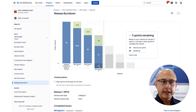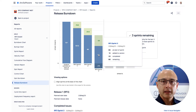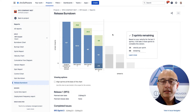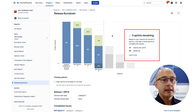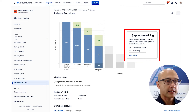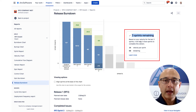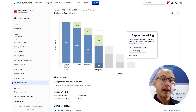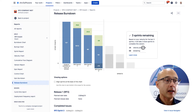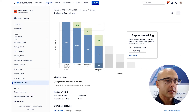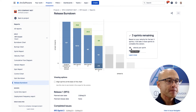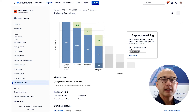For a more detailed breakdown, you can click on a bar to see the details. If you have at least three sprints completed, you'll get an indication of how long there is to go. Here it's saying three sprints remaining. It calculates that by taking the average of the last three sprints — my average is 25 points per sprint — with 68 points remaining, so it's basically 68 divided by 25, giving three sprints to go.